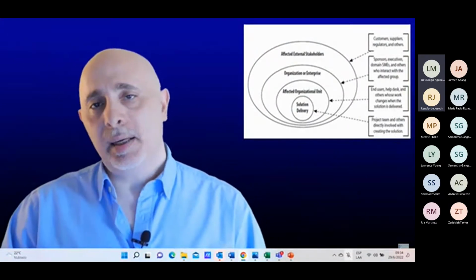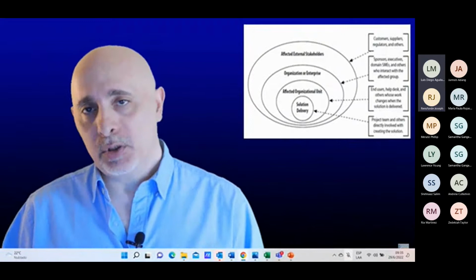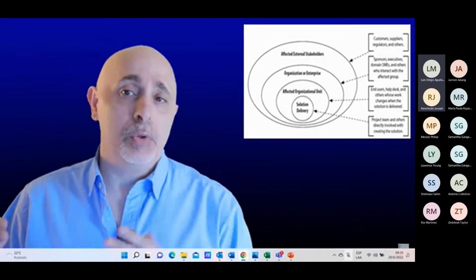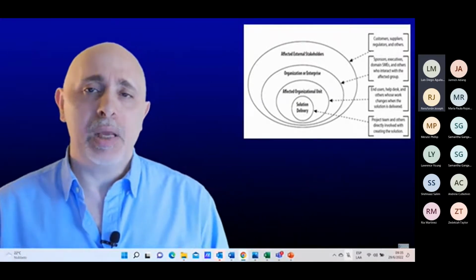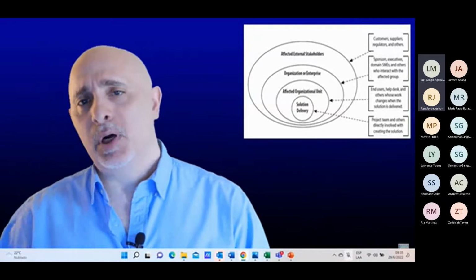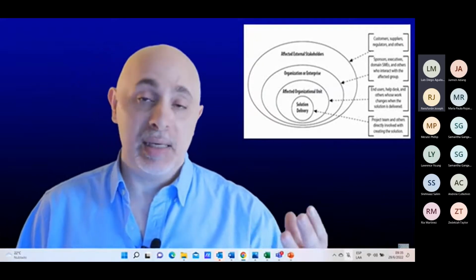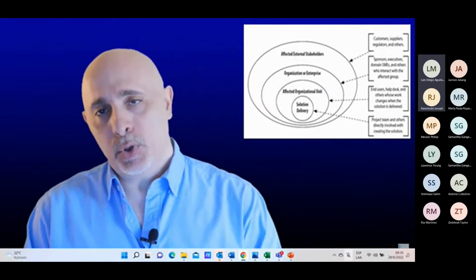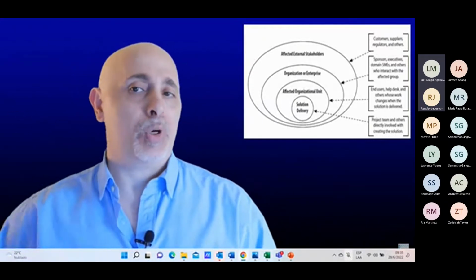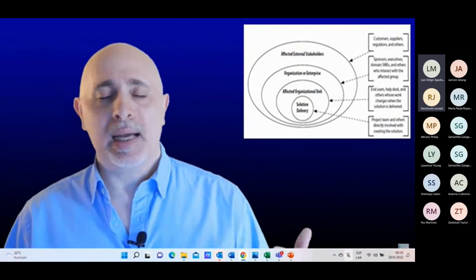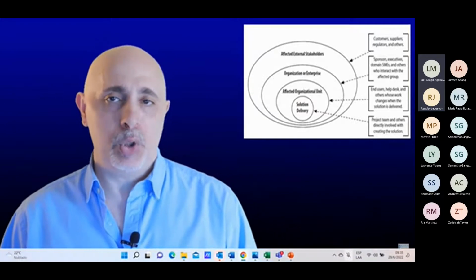stakeholders. From the heart, you go to the second layer, which is the directly impacted department within the organization that is asking for this work to be done. Now, obviously, this makes a difference if you're doing the work inside the organization or if it's your own initiative outside. But, outside of the people doing the work, directly impacted organizations and so on, who are these that want this result? Who are the ones that ask for it? It is possible that sales or HR ask for you to do the work, and so they become that second layer. Then you can go to the third layer, which is the whole enterprise, your whole organization, subject matter experts, people outside of the project that are within the enterprise or organization that can support your project.